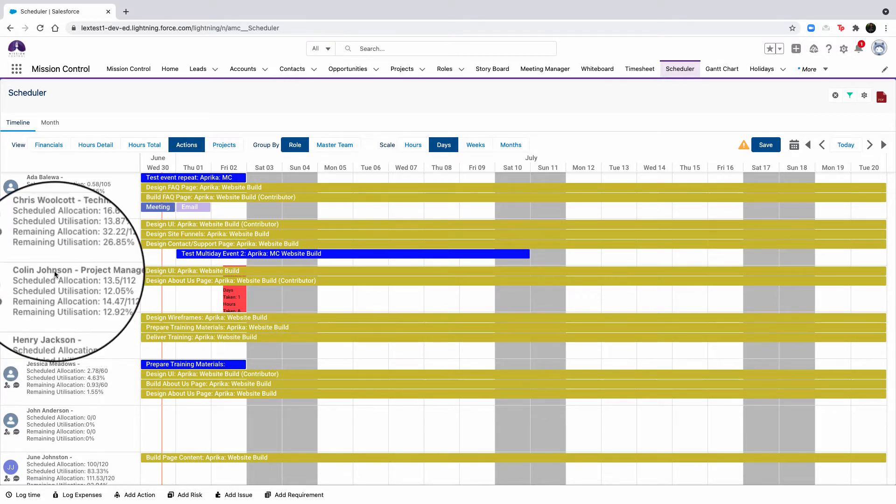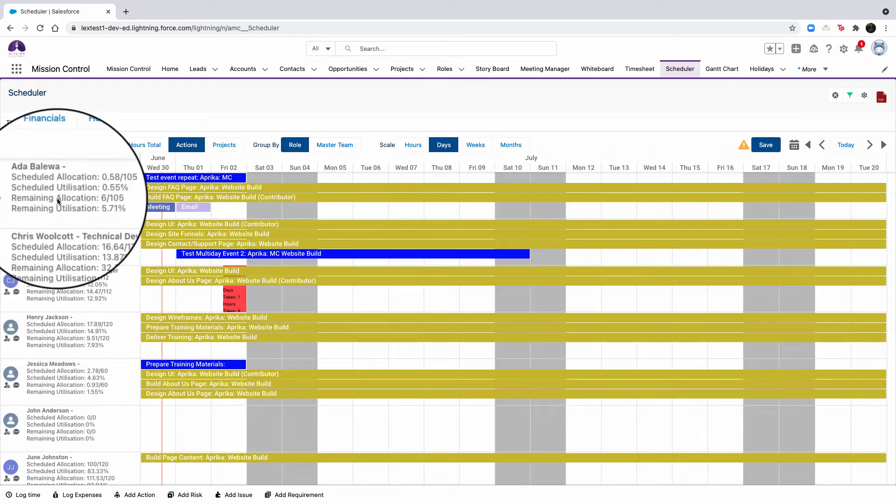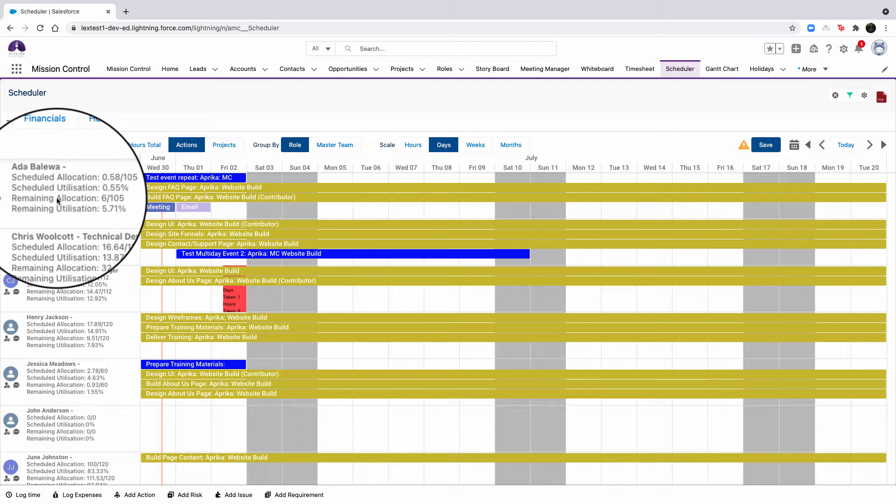To break this down, the scheduled allocation calculates the total contribution for the actions contained within the timeline view. The scheduled utilization calculates the utilization percentage for the role based on the total contribution by the hours per week. The remaining allocation calculates the effort remaining for the role based on the actions within the timeline view, plus any overdue actions that are scheduled and not yet complete prior to the end date of the timeline. This calculation is based on the total contribution of effort minus the hours completed by this role on the actions. The remaining utilization calculates the utilization percentage for the role based on the remaining effort by the hours per week.